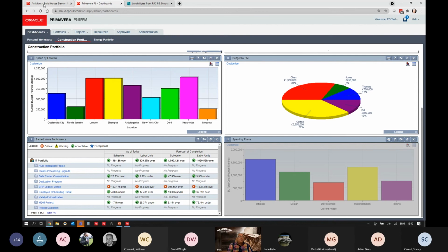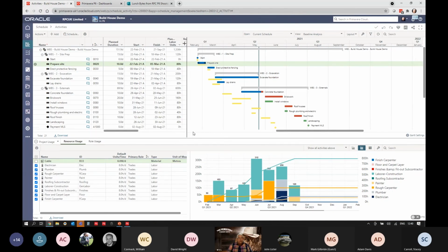And the final one is the new boy on the block, which is OPC. So again, I think this looks a really clean and tidy interface. Of course, this is just the planning and scheduling view here. So this is the Gantt chart showing my actuals to this side of the data date line. There's my baseline bars. I can see my forecast. I've got my critical path. I can show relationships. I can create inter-project relationships, so I can link two projects together.